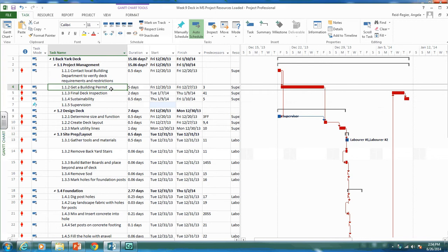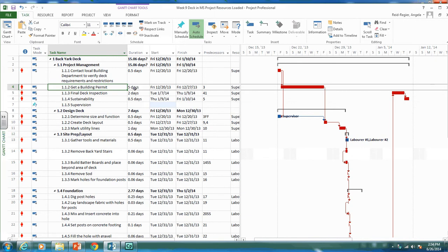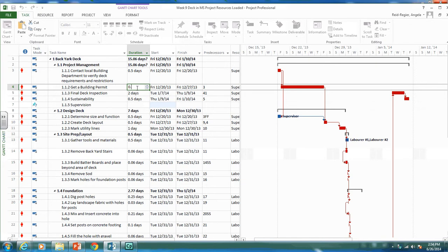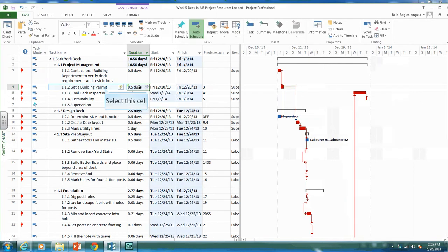It probably only takes a couple hours, half a day, to fill out the paperwork to get the building permit, but then a week to wait for it. That's why we have five days in there. Instead of putting five days, we could put half a day to represent the paperwork time and then put a lag instead.